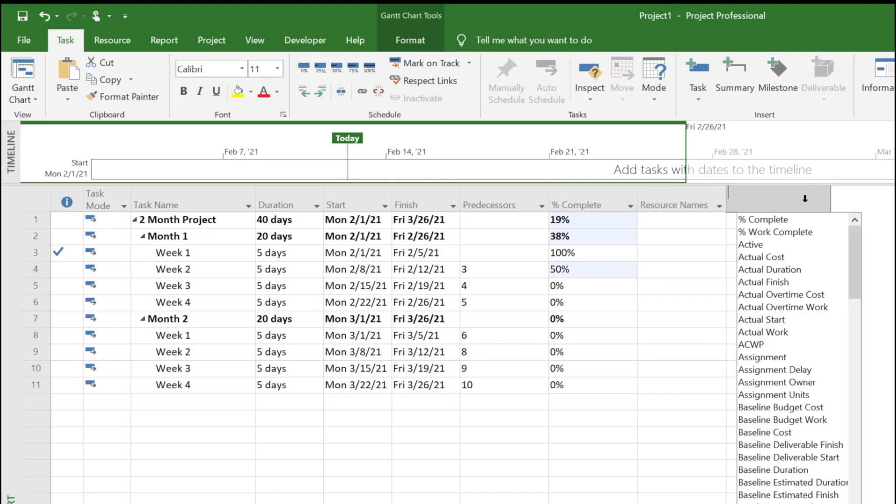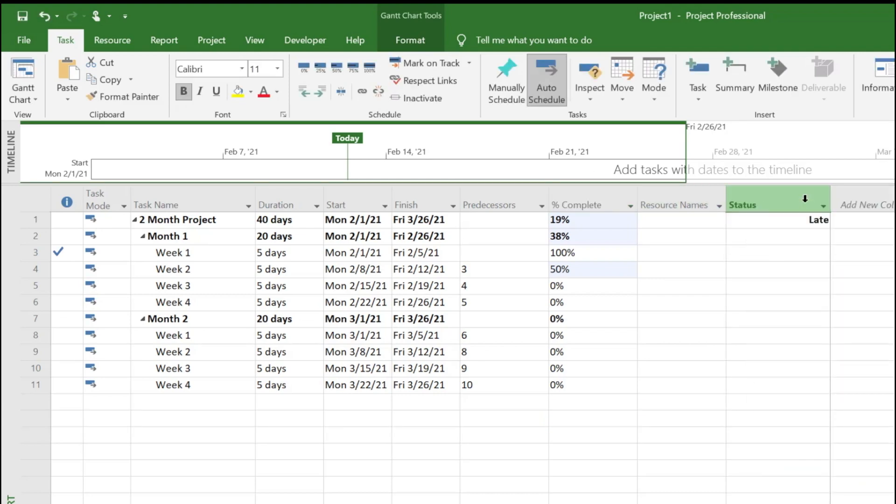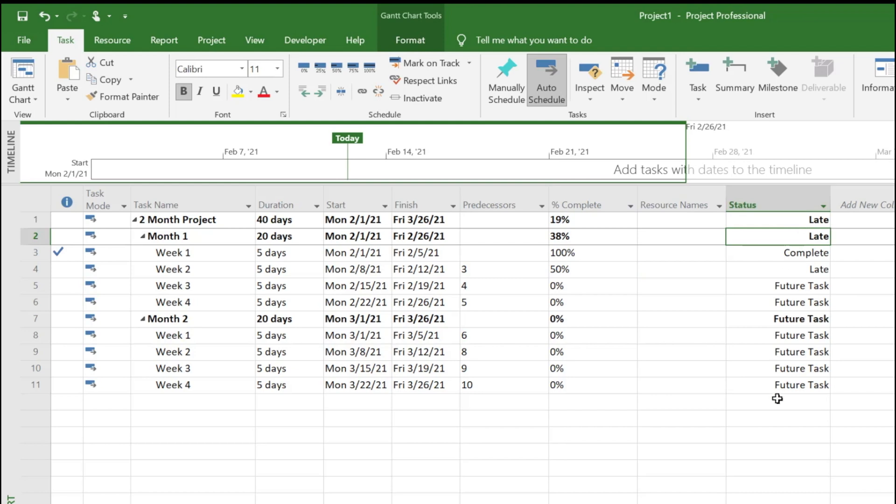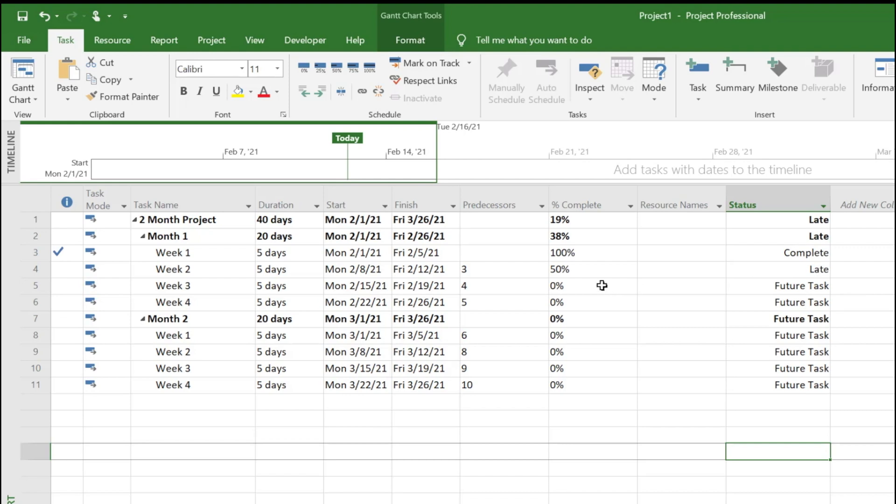Now we want to quickly see which tasks are delayed or late. MS Project has a built-in column called status that will let you know which tasks are running late and whether they're on schedule.